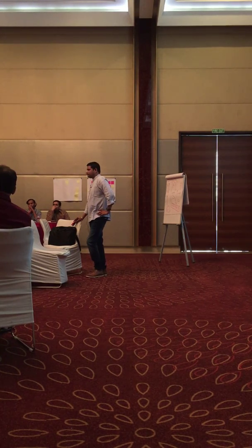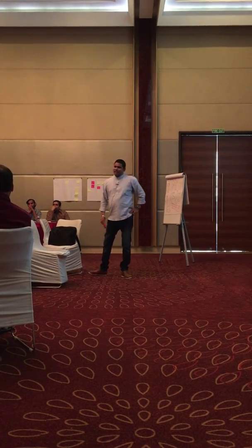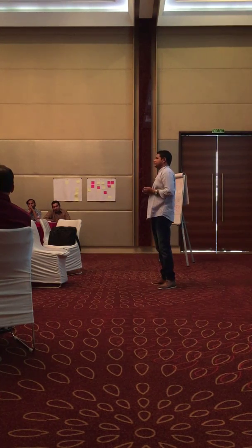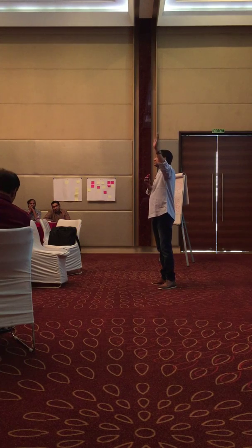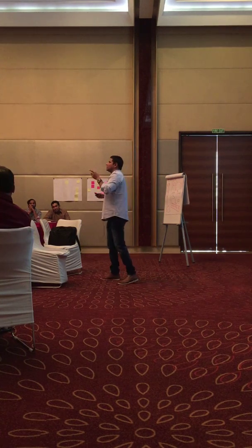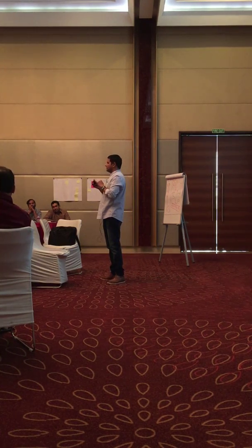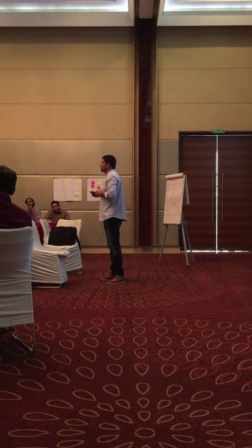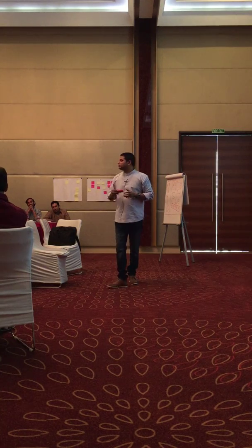Before coming to the plan, you finish off all detailed discussions. Is it out of the scrum or within the scrum? Everything that you do is part of the sprint and scrum, except the initial architectural things. Because you said something is not clear, right? So there is one concept called definition of ready. We use the definition of ready, and only items meeting the definition of ready will be picked up into the sprint. First thing. Second thing, your product owner is sitting next to you.